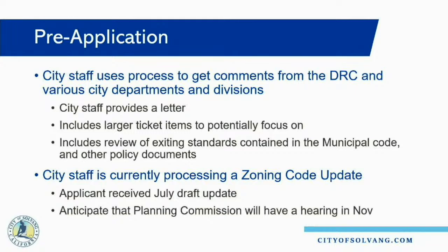So now that you hopefully understand the pre-application process, it is not a formal submittal. This isn't guaranteed any actual submittal, so I just want to couch that immediately. This doesn't mean that this is going to move forward. This can definitely morph into something completely different, but that, again, is the point of the pre-application, to really flesh out those larger design and preliminary schemes and provide the applicant a much wider lens to then really refine whatever project they have coming into a formal application, therefore hopefully cutting the entitlement time, because now we've really already taken a hard look at it once, and it comes back in a much easier and smoother fashion.